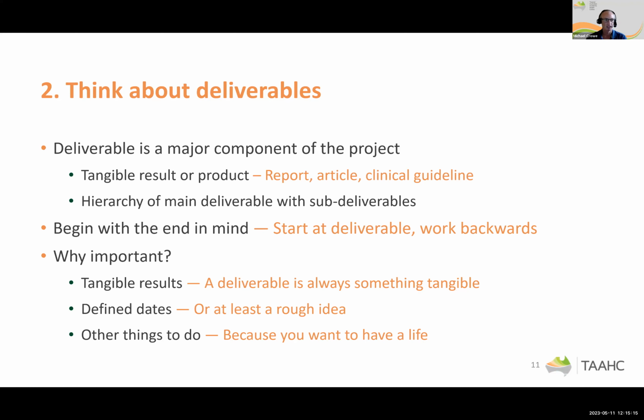There's usually then a hierarchy of deliverables. So you have your overall project, and then below that you have your deliverables, and then below them you have your sub-deliverables. So each sub-deliverable is working towards your deliverable, which is working towards the overall project. There are lots of things that can be deliverables: lab notebooks, proposals, lit review, some sort of a report. As I say, it's even things like presentations. So a slide deck or your PowerPoints for a presentation becomes something that's tangible.